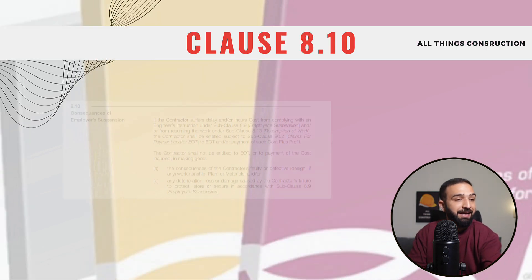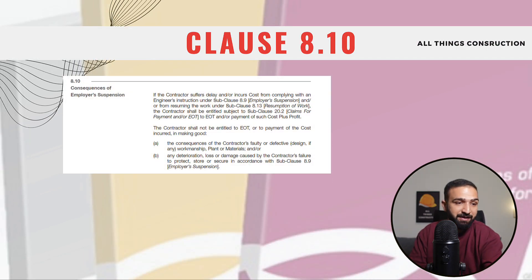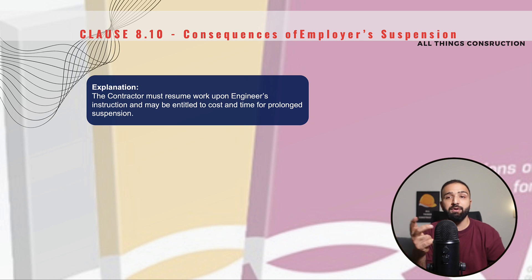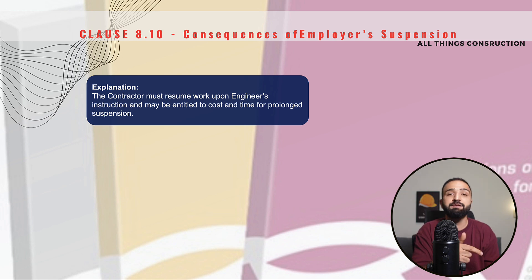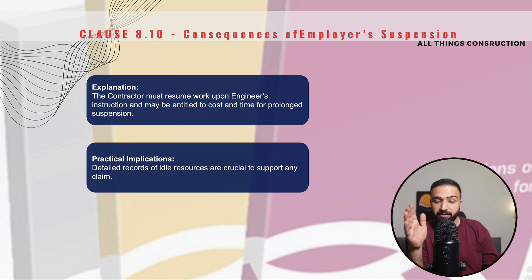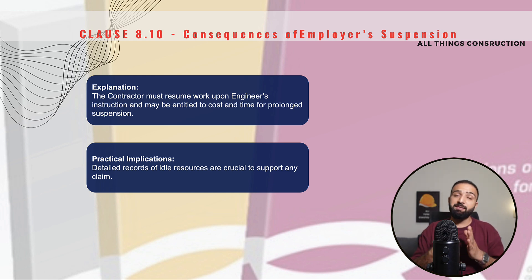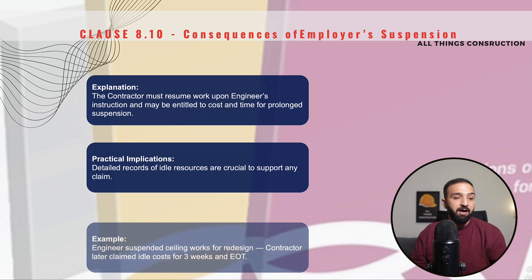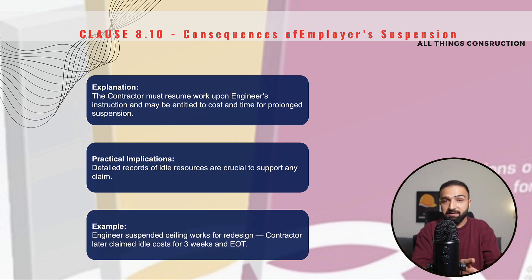Clause 8.10 is Consequences of Employer's Suspension. Basically, this clause states that if we suffer delay or cost impact due to suspension, we are entitled to recovering these costs, especially if the cause of the suspension had nothing to do with us. It is very important that during the suspension period, we contractors must record all idle resources or any other impact we are incurring in order to substantiate our claims.